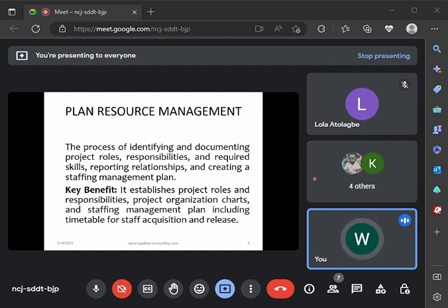Is it possible for the project manager to relate with the functional manager? In this context, remember we are looking at organization. Remember I told you an assumption that in your exam or whatever material you are studying, when they make reference to the word organization, indirectly they are referring to a matrix organization setting, except otherwise stated in the question. What that implies is that in a matrix organization setting, the project manager works directly with the functional manager.